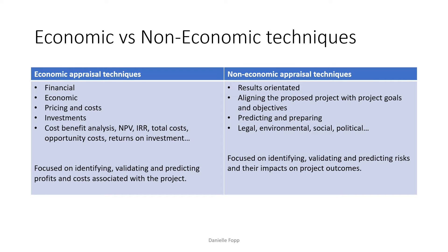These techniques can be grouped broadly into the economic and the non-economic techniques. They do overlap and intertwine, however broadly we can separate the two. The financial or economic appraisal is designed to determine whether the financial costs and returns are properly estimated. These would have been roughly completed in the feasibility stage, but now it is the time of the project appraiser to determine and provide a recommendation on whether the project is financially viable. They will use cost-benefit analysis, NPV, IRR, and so on to do this.